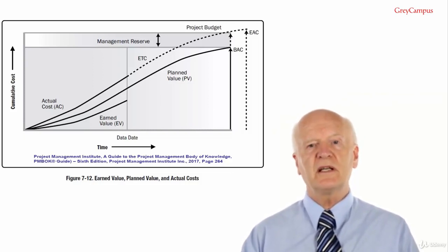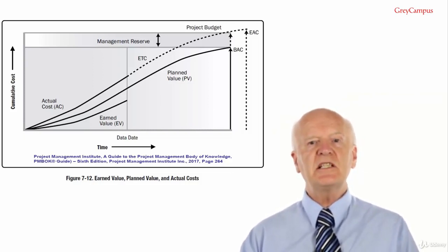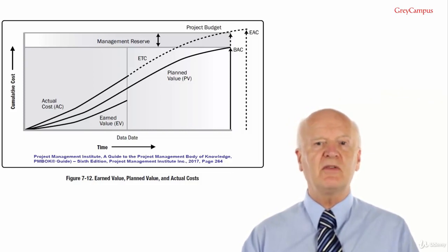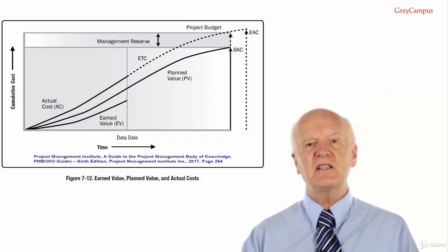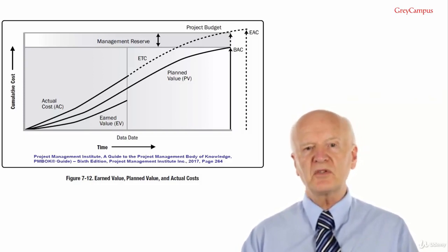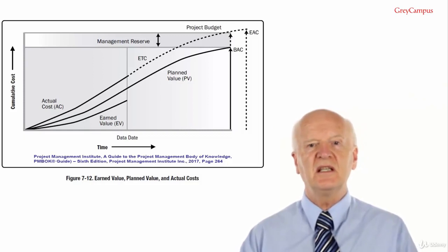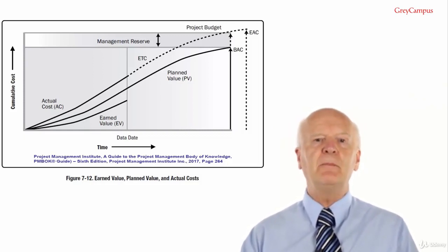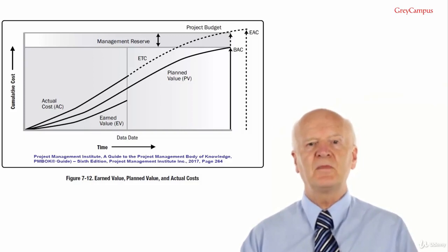Estimate at completion forecast for ETC work, considering both SPI and CPI factors. In this EAC forecast, the ETC work will be performed at an efficiency rate that considers both the cost and schedule performance indices. This method is most useful when the project schedule is a factor impacting the ETC effort.